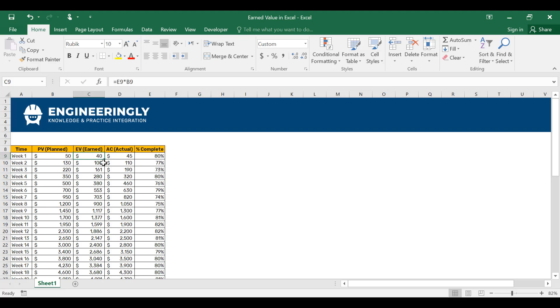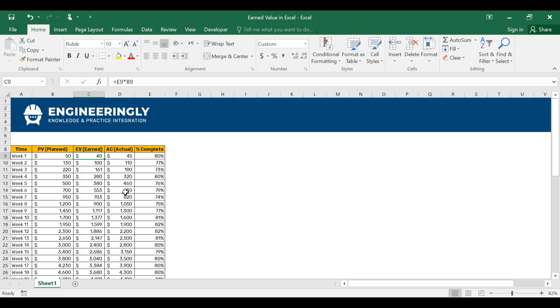Earned value is basically the percentage completed of all the activities in this week times the planned value. So what we will do is multiply this cell by this cell, which is 80% completed. This will be 80% multiplied by 50, which will be 40. Same applies for the rest of the cells. And for the actual cost, these are the values that we will get throughout our project's execution phase. In other words, the actual cost values are independent of anything and they are directly entered into this table.